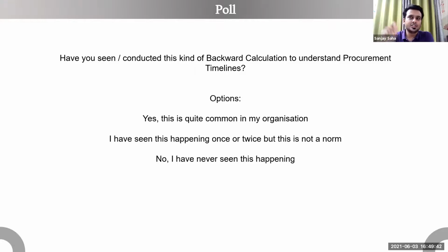I don't know if you have heard this statistic somewhere, but statistics say that to have the right competition in any bidding process, the required number of bidders should be at least 5. If you have about 5 bidders for any competitive process, you are going to get almost the best possible price.